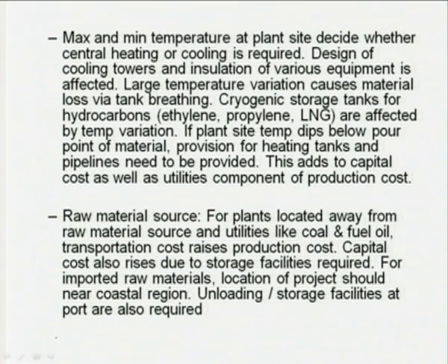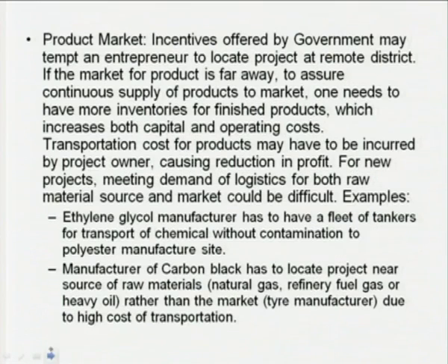In some cases, the project owner may be required to have his own specially dedicated fleet of trucks or rail tankers for the supply of raw material, which also adds to the capital and operating cost. Then the next thing is the product market. If we have to satisfy the prosperity factor, one may have to locate industry in a notified industrial backward district. In that case, we are going to have special benefits, as I said, the government offers incentives.